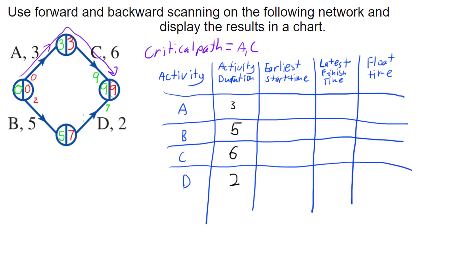The earliest start times come from the forward scanning — the number in the node to the left of each arc. The earliest I can start A is zero, and in fact it must start at zero because it's on the critical path. The earliest I can start B is zero. The earliest I can start C is minute three. The earliest I can start D is minute five.